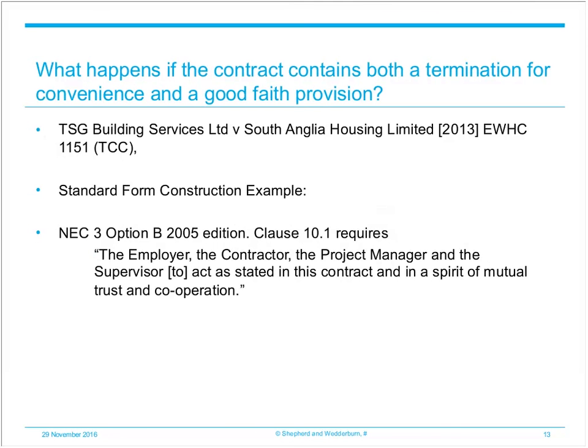A more applicable example of an express provision for good faith having limited influence in practice can be seen in NEC 3 Option B, the 2005 edition, where Clause 10.1 requires the employer, the contractor, the project manager and the supervisor to act as stated in this contract and in a spirit of mutual trust and cooperation. While this clause may seem to provide an element of good faith in construction contracts which are subject to those conditions, in reality it has limited effect.